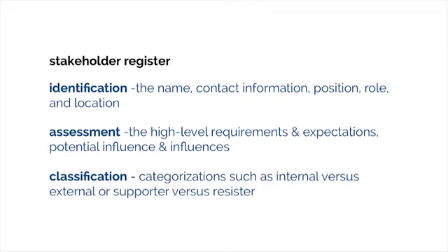Note that the stakeholder details such as level of influence, requirements, expectations, and classification become more defined and understood throughout the project. So it's important to continue to review and update the Stakeholder Register with more detail throughout the project.